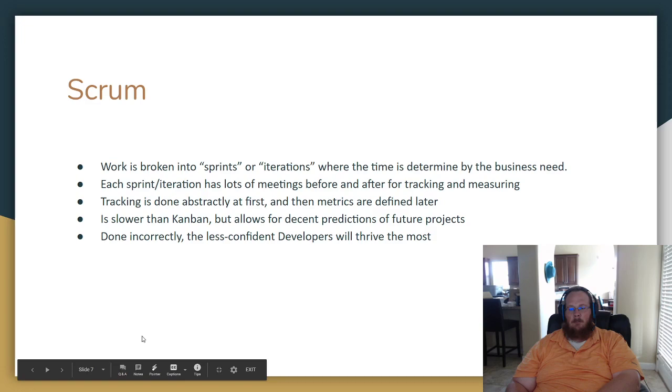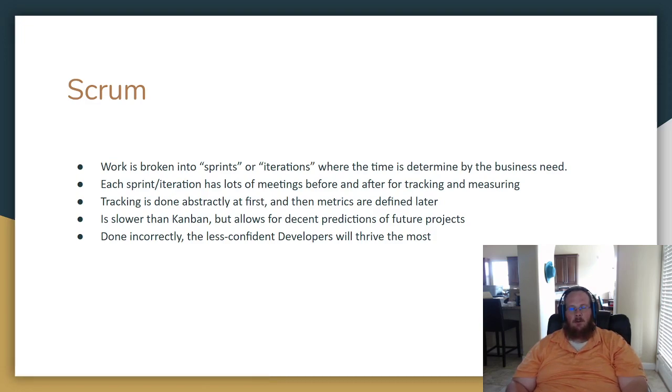As you're estimating, work is assigned to you based off of your estimation of it. So if you estimate a 2 and someone else estimated a 4, and your metric for measurement is similar, they'll want you to work on it because you can do it faster than the other person. And that's kind of how work gets dished out, and it happens sprint by sprint. So you end up with a bunch of Post-it notes. You go walking back to your desk and you say, okay, for the next 2 weeks, this is what I'm working on. And when I'm done, well, it's a different methodology in different companies.